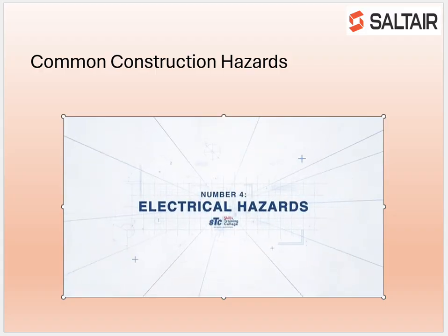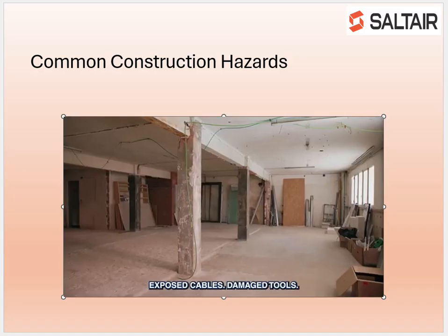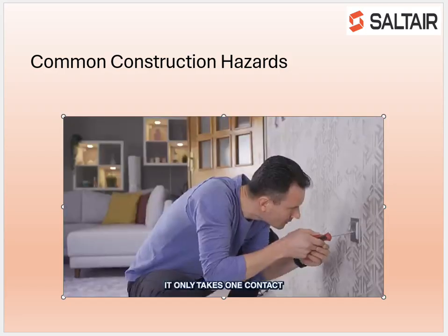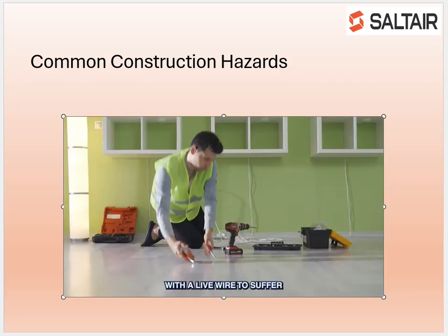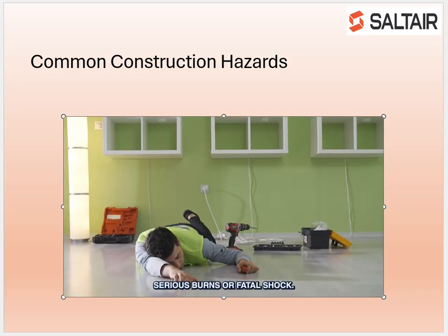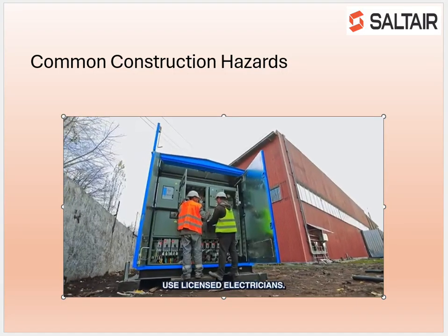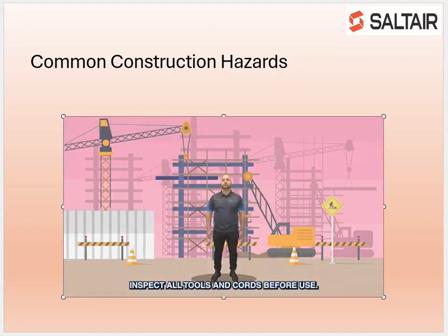Number 4, electrical hazards. Live power lines, exposed cables, damaged tools. Electricity is an invisible hazard. It only takes one contact with a live wire to suffer serious burns or fatal shock. Always assume wires are live until tested. Use licensed electricians and inspect all tools and cords before use.